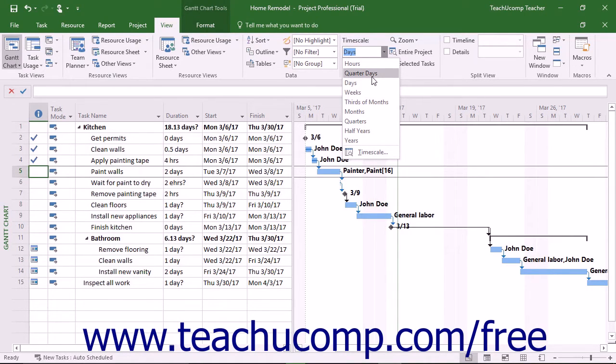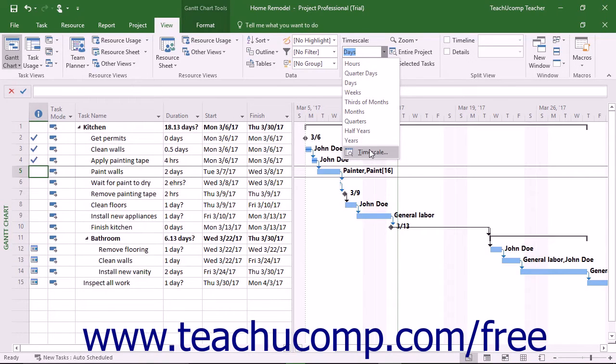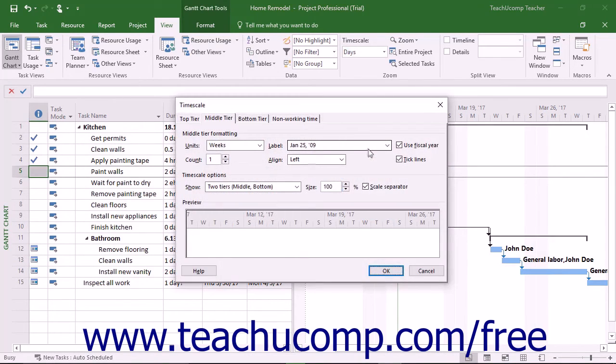To see all of your time scale formatting options, select the Time Scale command from the drop-down menu to open the Time Scale dialog box.